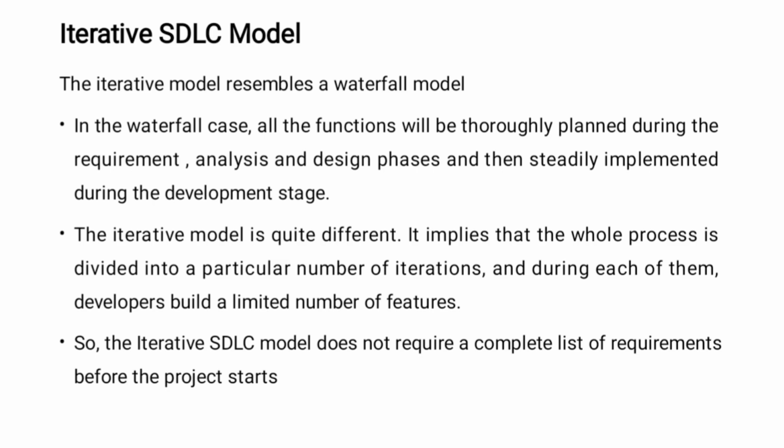That is, it implies that the whole process is divided into a number of iterations, and during each of them, developers build a limited number of features. So the iterative software development lifecycle model does not require a complete list of requirements before the project starts.